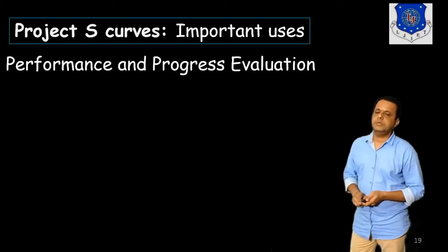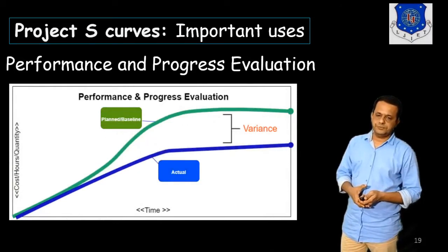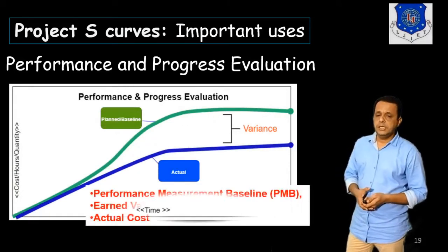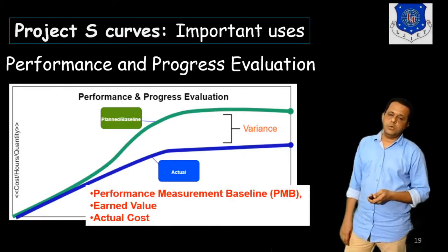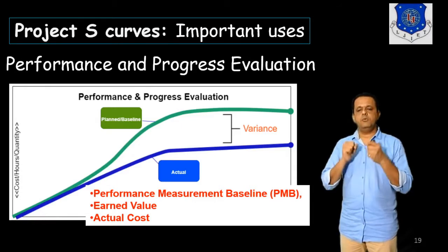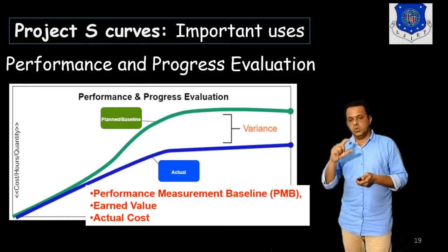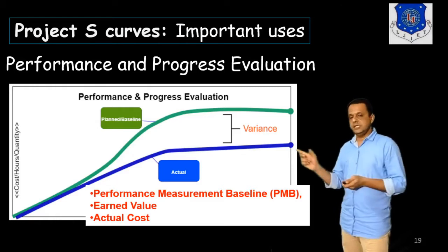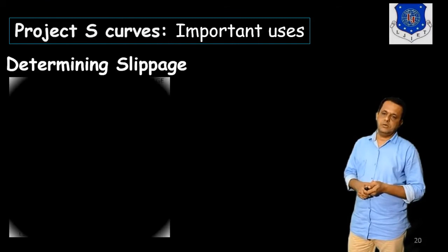Here are important uses of the S-curve, like performance and progress evaluation. Then here you can talk about the baseline for the performance measurement. What is the earned value and what is the actual cost? So variance can be calculated as you see in the typical S-curve.